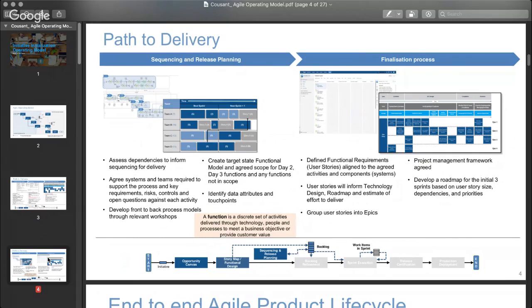And that just means where you've got your user stories that you're going to focus on for this particular sprint. A sprint is just how we refer to different deliverables, like deliverable stages, right? So a sprint is normally 3 weeks long, 2 weeks for development, 1 week for QA. And because Agile is different to other methodologies in that it gives you deliveries quicker than maybe waterfall. Waterfall, you have to go through one stage before you can get to the next. In Agile, you can do everything iteratively. That just means you can do it all in parallel.